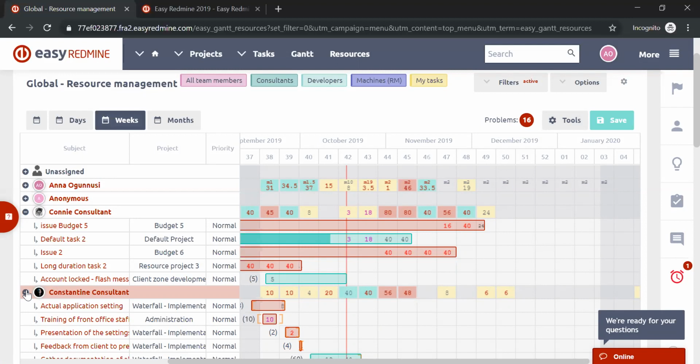The thing is that the balance tool pretty much only works with the current state. So if the person has some vacations logged in at this moment, it will take them into account. But once you use the balance tool and you log some vacation afterwards, you have to use the balance tool again. It won't change based on the new vacation. So it has to be redone if you make some changes to the capacities and the vacation.